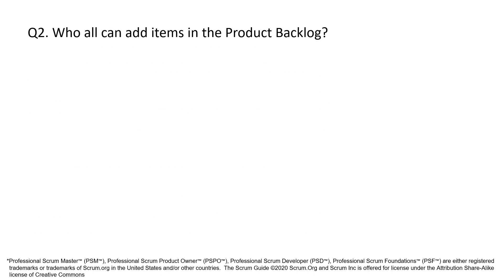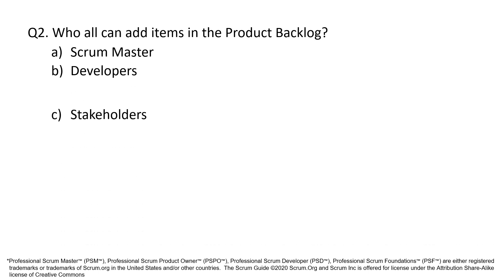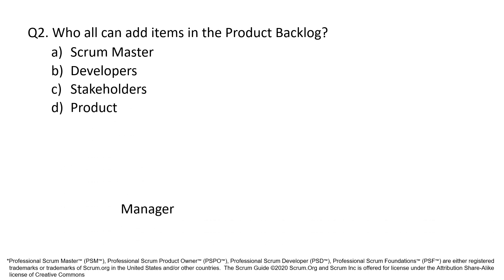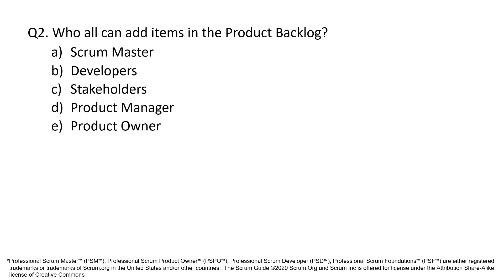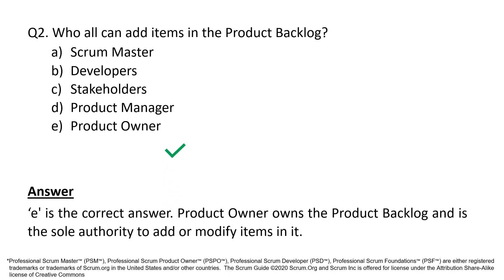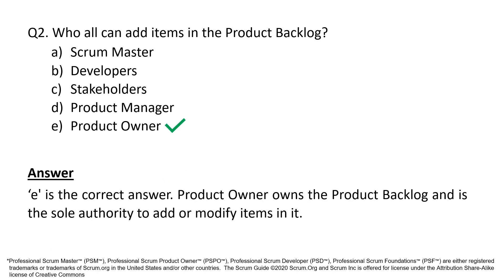Question 2. Who all can add items in the Product Backlog? A. Scrum Master. B. Developers. C. Stakeholders. D. Product Manager. E. Product Owner. E is the correct answer.